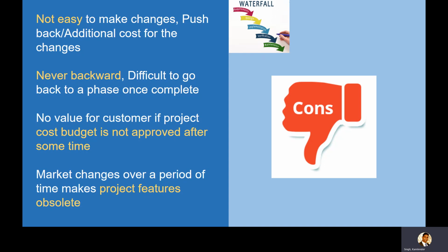Let's say that in the user acceptance phase, when customers see your project and he sees that things are implemented differently or understood differently, and he wants you to make a change, what will happen? A change request will be asked. Change request is what? Additional time, cost, or resources. Either one of them or of these three dimensions, time, cost, or resources, or at least two of these dimensions will be asked, so that these changes can be accommodated, but we need this. Now that is where it brings unhappiness for the customer from the cost perspective, or the schedule is getting delayed, cost is increased. So this will happen because it's not easy to make the changes.